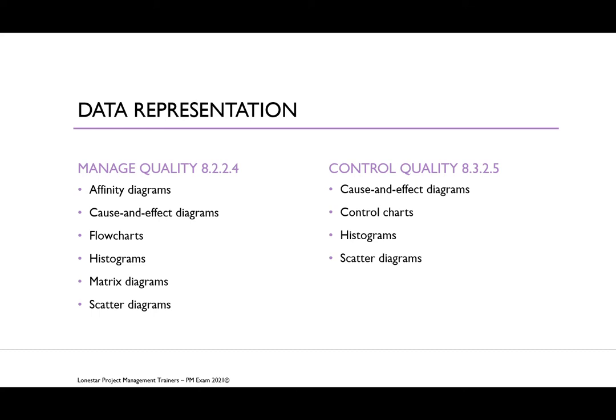Let's now bring in our control chart. Now, the control chart is used to determine whether or not a process is stable or has predictable performance. Now, the upper and lower specification limits are based on requirements and reflect the maximum and minimum values allowed. Your upper and lower control limits are different from specification limits. The control limits are determined using standard statistical calculations and principles to ultimately establish the natural capability outside the control limits.